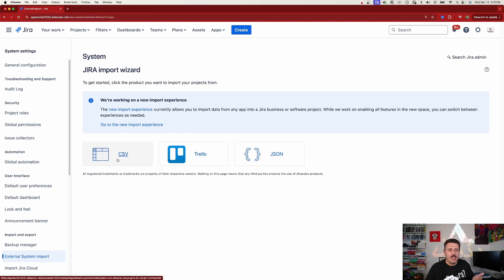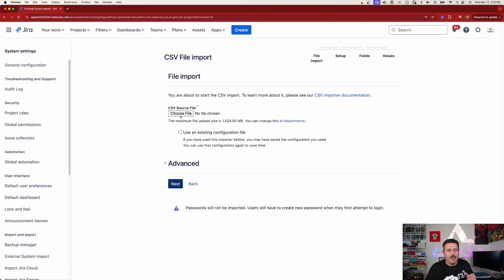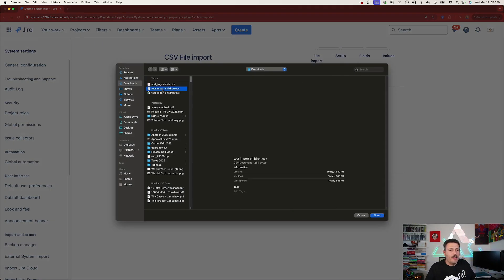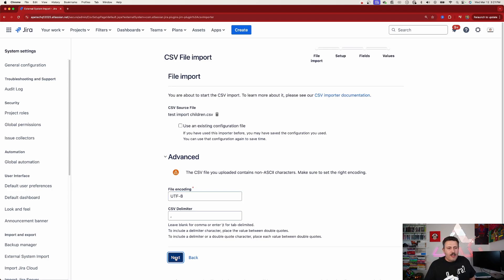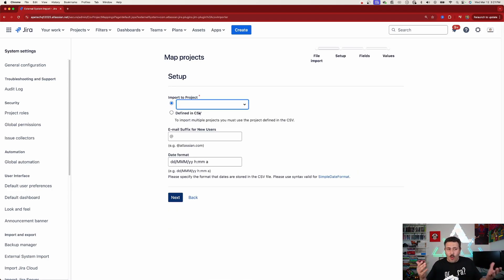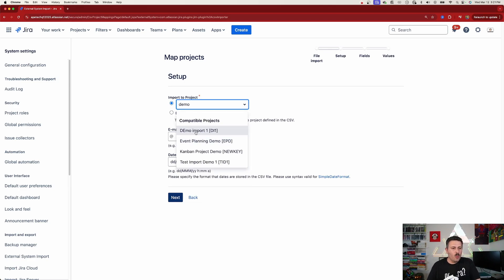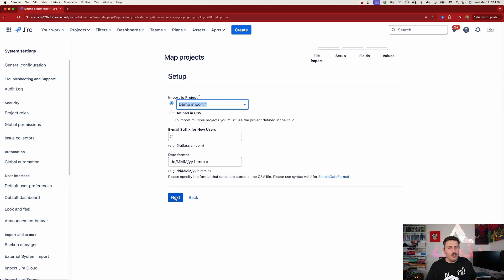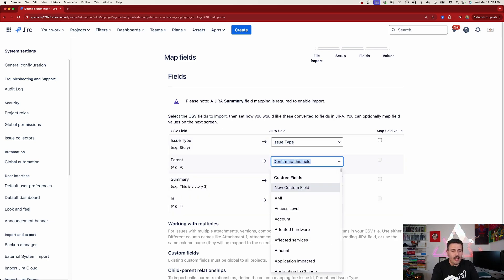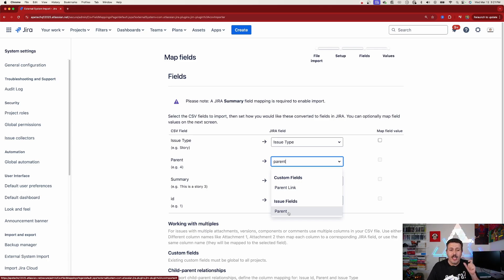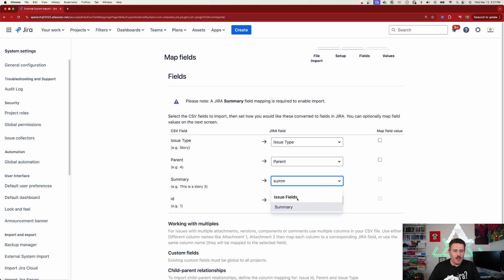While the other import was running, I updated my CSV file — just updated the summaries to have a number three — so we're importing basically the same issues. Select your CSV file, click Open, click Next, and now you can select your existing project. This is the key advantage — I'm going to pick Demo Import One, the same project we just used. Skip users and dates, click Next, and now we need to do some manual mapping. Map issue type, parent — make sure you pick 'Parent' not 'Parent Link' — summary, and issue ID.